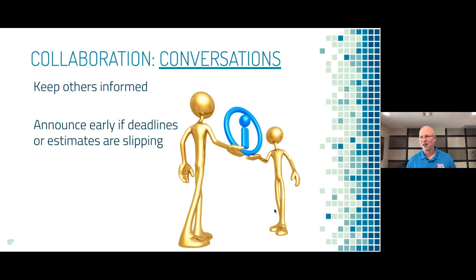But if you can come in as early as you know, a month or two early, and say, "You know what, I'm concerned about our deadline, I think there's a risk here," then you allow the business, you allow the company, to mitigate that risk as best they see fit and give them the ability to manage these things. Again, this comes down to that vulnerable trust of admitting that you might not make the deadline or you might miss your estimate or something like that.